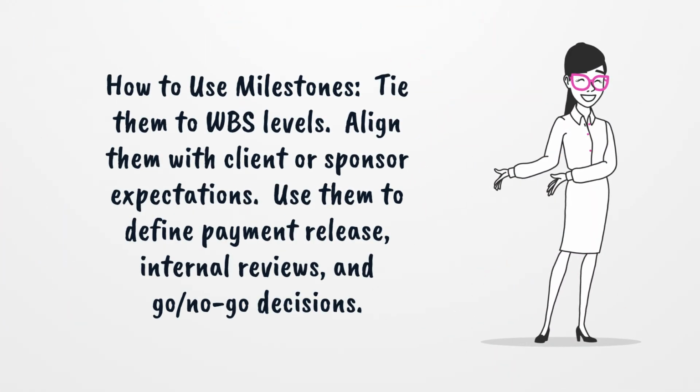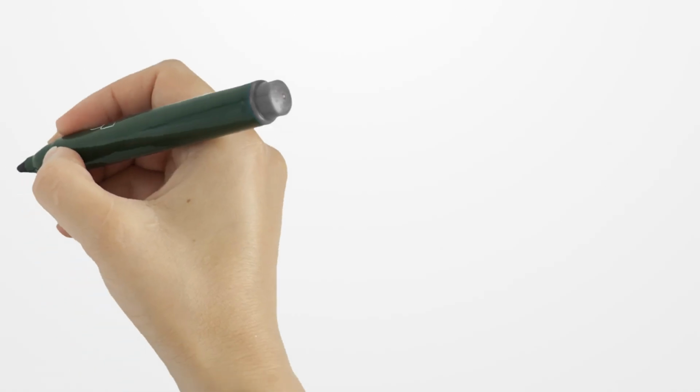How to use milestones. Tie them to WBS levels. Align them with client or sponsor expectations. Use them to define payment release, internal reviews, and go/no-go decisions.